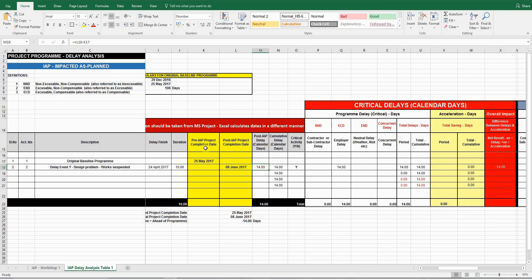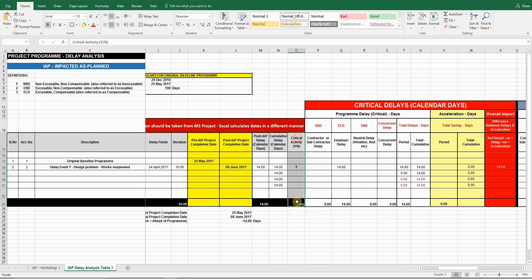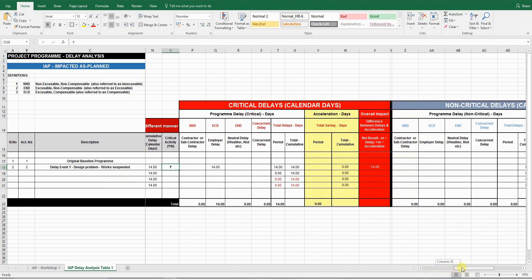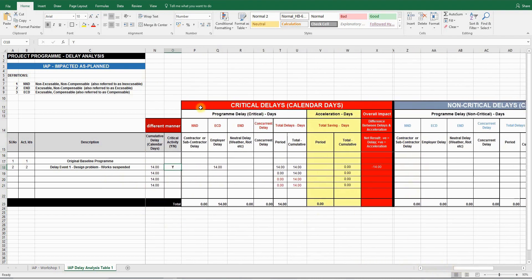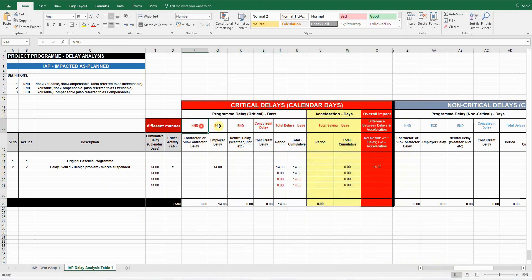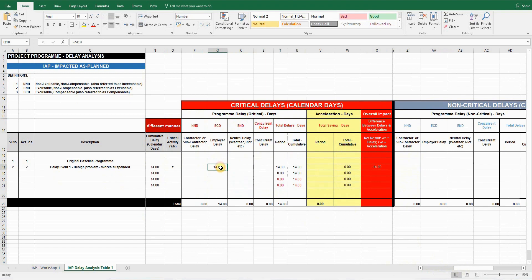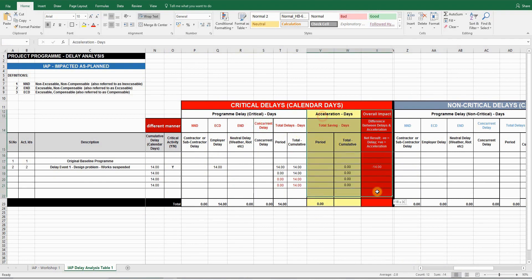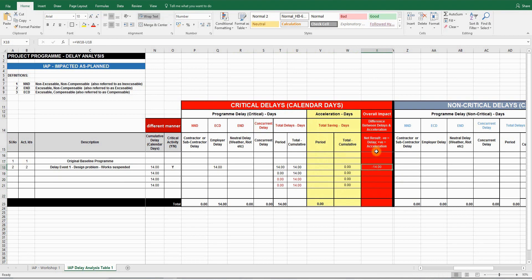So you have a pre-IAP project completion date and a post-IAP project completion date. IAP stands for impacted as planned. And you have to answer whether the delay is critical or not. If the delay is critical, then you have to fill up this section. It's related to critical delays. And you have to insert the calendar delay within the appropriate column, whether it's NND, ECD, END, concurrent, etc. And the conclusion or the overall impact is shown here. If the number is negative, that means there's a critical delay to the program. If it's positive, that means the works are ahead of program.